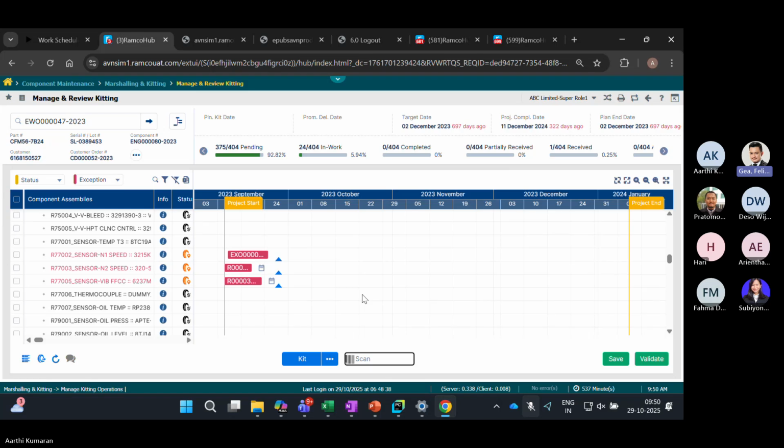So every engine, or every work order or project, will have its own demand. Now, the procurement team can use one demand to a PO, or they can plug multiple demands for the same part number and put it in one PO as well. So then you have demand from 5 engines propagating across one single PO, and that one PO will have 5 quantities, but each demand will have 1 quantity. The same PO number will then be listed for all of the 5 different projects that you're working on. But the initial request is by project, and then you can aggregate.